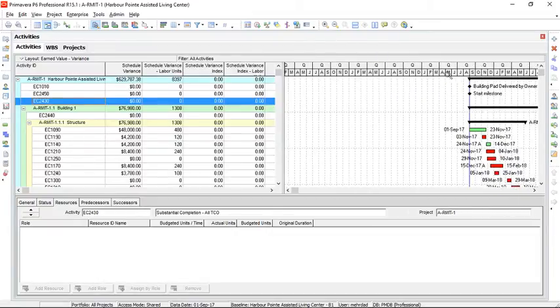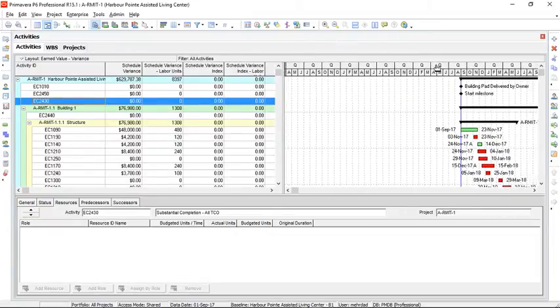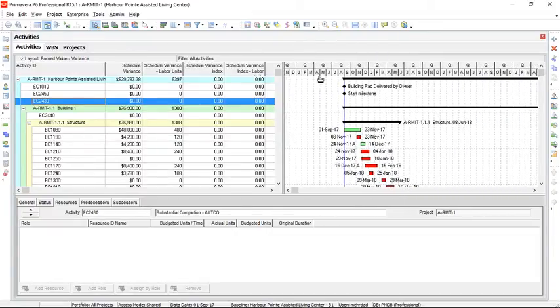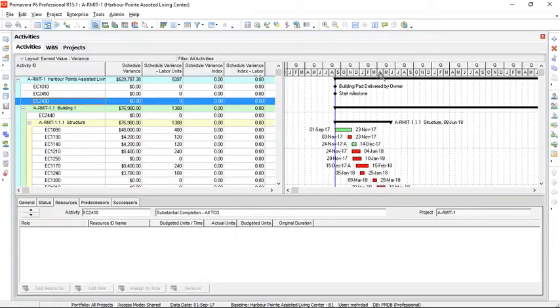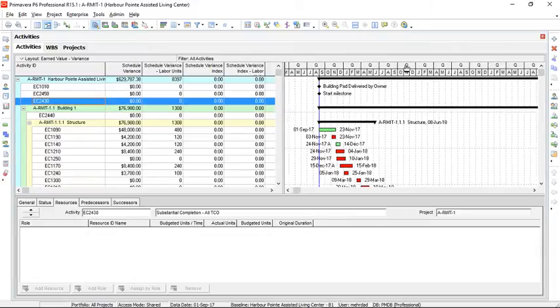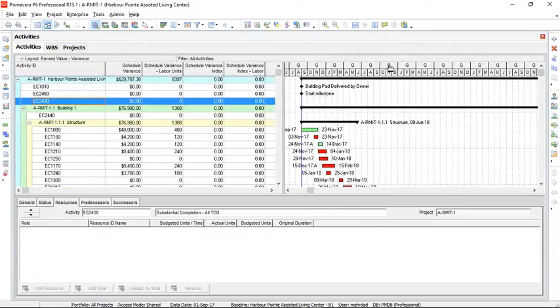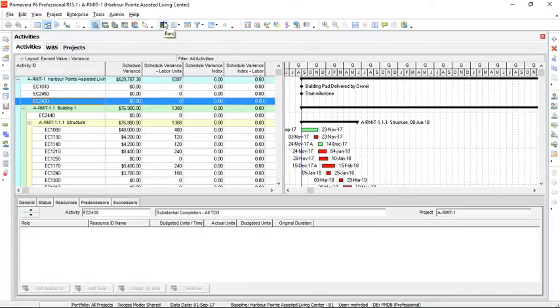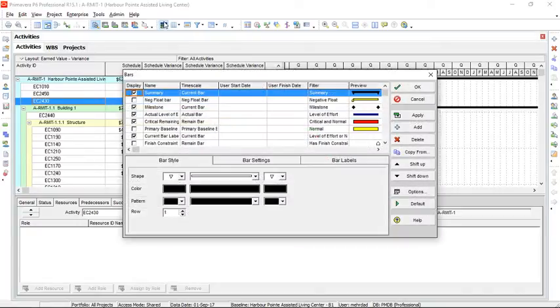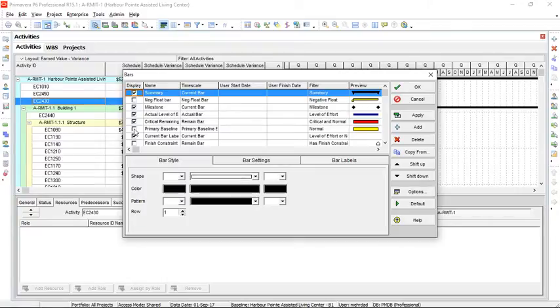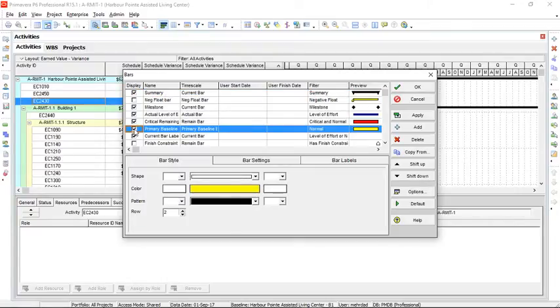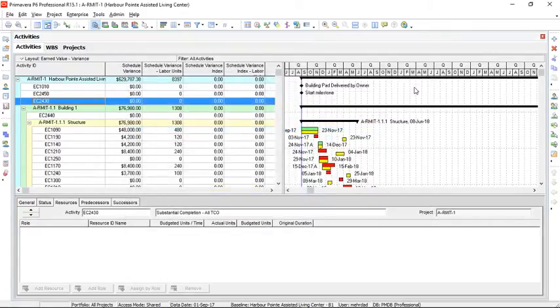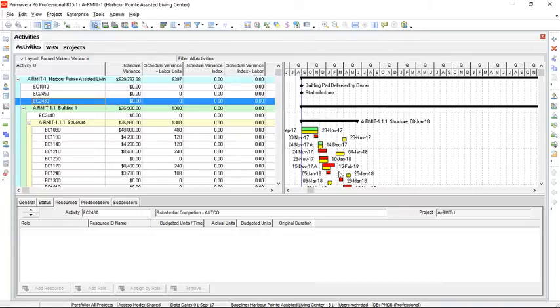As you can see, the baseline has now disappeared. We can go to the bars option and primary baseline needs to be selected and checked. When we press OK, the baseline can be seen.